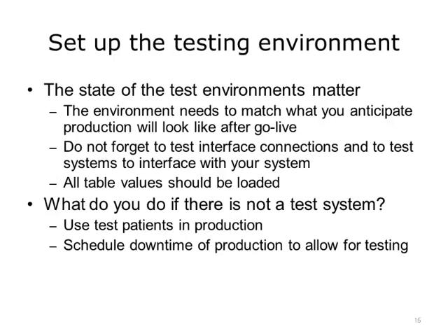Occasionally, a test system might not be available. This should be avoided as much as possible. However, if this occurs, sometimes the vendor will allow you to borrow a test system or test instance in the cloud. Sometimes test patients in production can be used, although this is dangerous because you do not want to corrupt production and want to limit production use for HIPAA reasons. Also, many tests require multiple patients. Sometimes you might have to schedule downtime of a production system to allow for testing. This is a last resort.